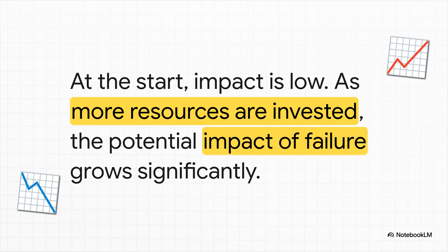But, and this is a huge but, there's a flip side. At the start of the project, the impact of a risk might be pretty low. You haven't invested a lot of time or money yet. Fast forward 6 months, though, and that exact same problem could be catastrophic because now you have so much more to lose. This is why you can never stop monitoring.